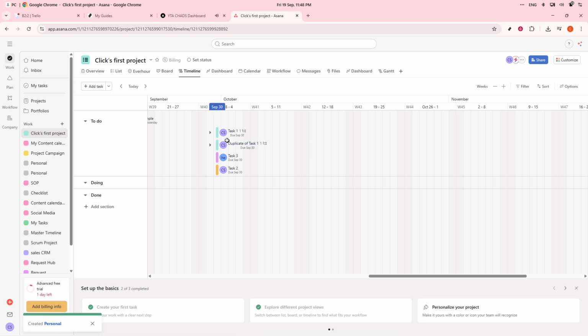Next, ensure that all your tasks are ready to be showcased on the Gantt chart by adding dates. Tasks that lack a start or due date simply won't appear in this view, so it's essential to fill in those details. Add both the start and end dates to every task to have them positioned on the timeline accurately. This helps you visualize the entire project's timeline and instantly see when each task kicks off and when it wraps up.